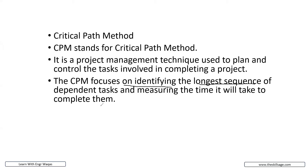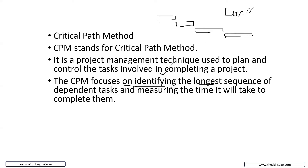We have different kinds of tasks. Up till now, we have only interlinked activities within one work package. Once we complete the full activity network diagram for the entire project, we will have different paths. Among those multiple paths, Primavera P6 is going to identify which one is the longest path technically, with dependent activities depending on each other. That longest path will be termed as the critical path.